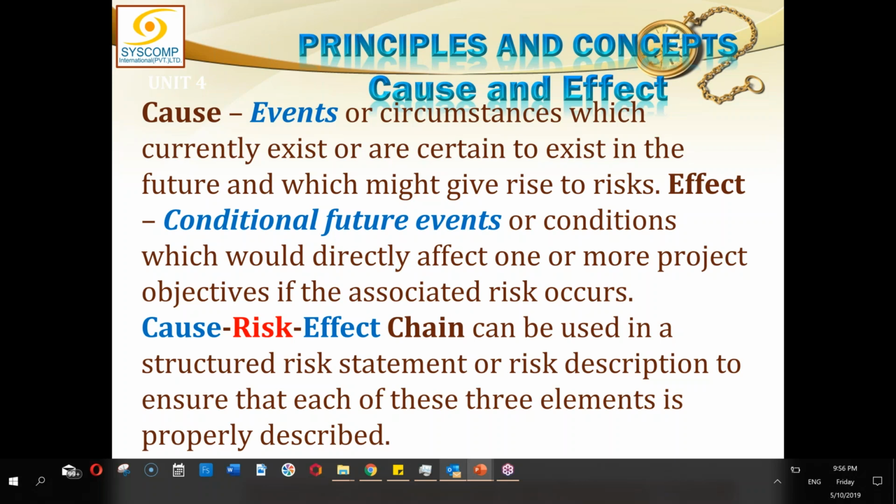Even if I open my company's risk register in front of me, I would find more or less the same problem there in the risk definition, almost everywhere. Exactly. The risks are so poorly worded. So what do you expect the actions taken on them will be? Actually, even the risk in itself is not clear. How are we going to analyze this risk, and how are we going to have any response to it? So whatever we do, it will be faulty. So the very first thing is, when we are identifying the risk, it should be properly identified in a cause, risk, effect format, and we must debate it and put the things at the right place.